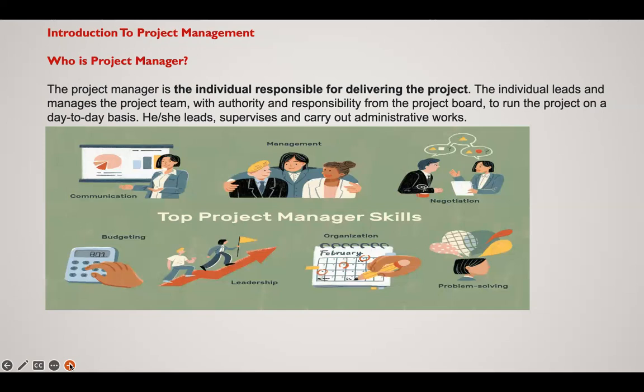So when you are looking at your plan, and maybe the engineering team leader said, okay, we need more people, you will need to allow the commercial manager. This is what the engineering lead said: I need 7 people, but we've only allowed for 5 people. You need to speak to your project manager, or you go straight to the project manager. This is what is happening, because he's the one thinking about the budget.